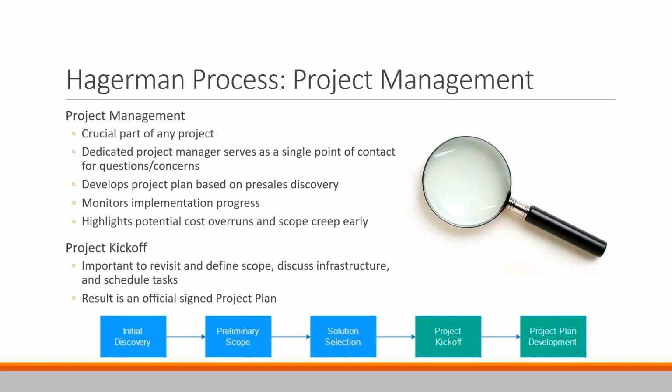Now we have started assigning dedicated project managers to all of our projects. We've been doing that for quite a while now. So there is a single point of contact if necessary for any questions or concerns about the implementation. They do what a project manager is meant to do, right? They monitor the project, they monitor the progress, facilitate communication, work on scheduling, and one of their most important tasks is to keep track of how many hours have been spent on the project and make sure that if we